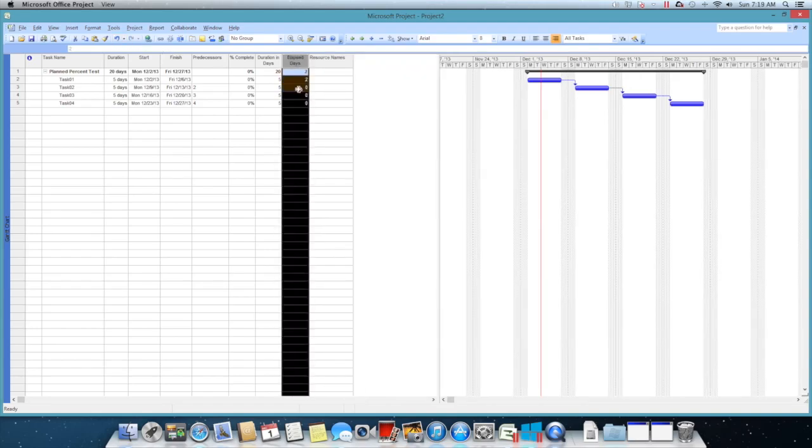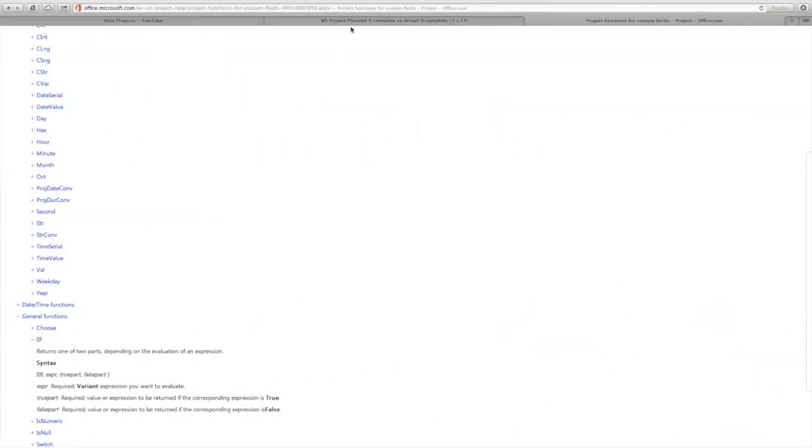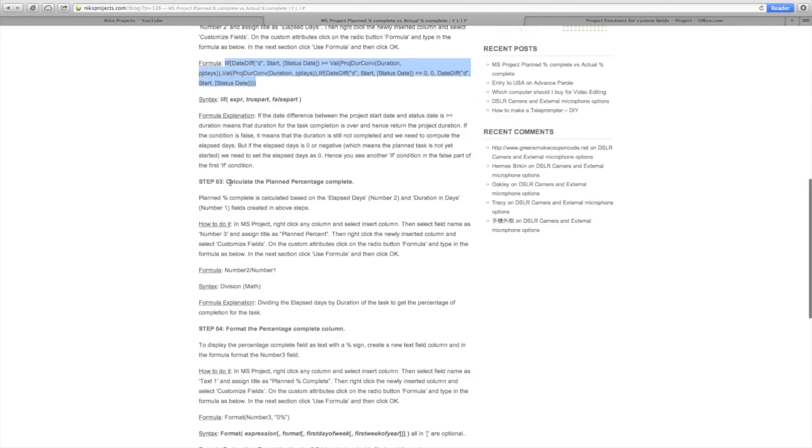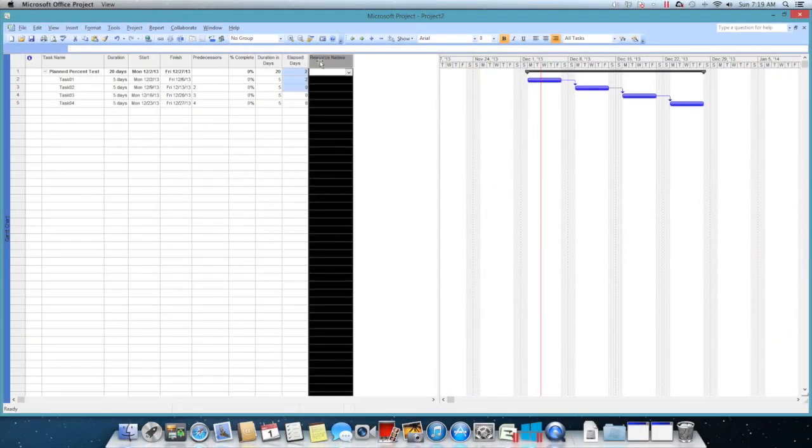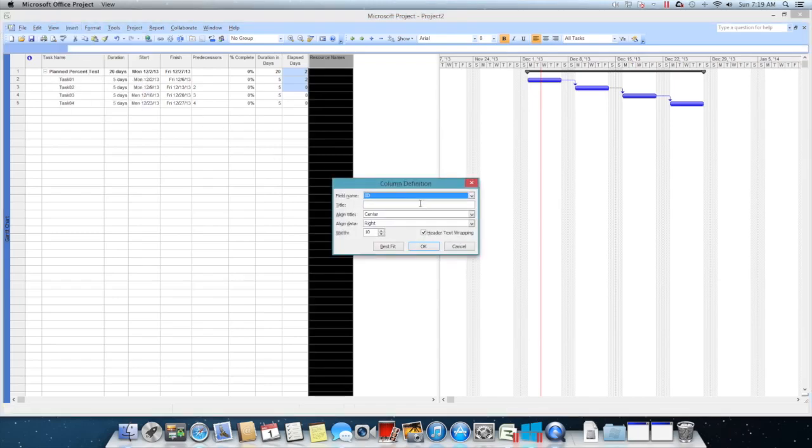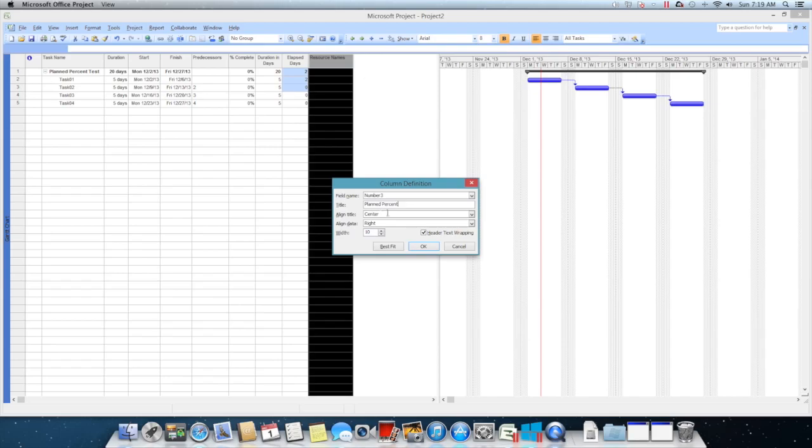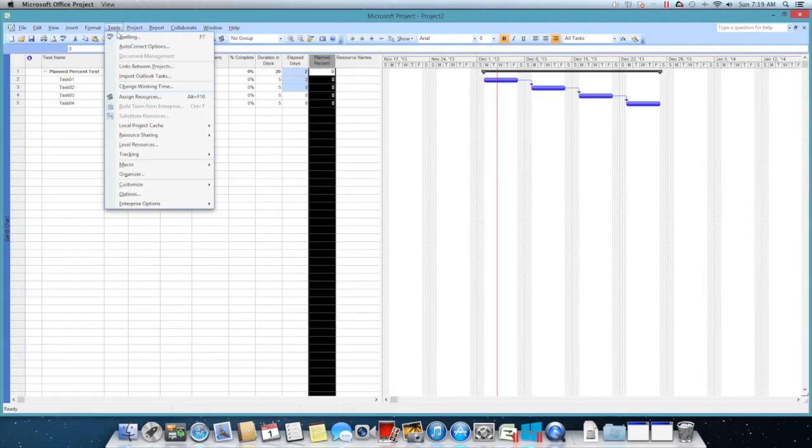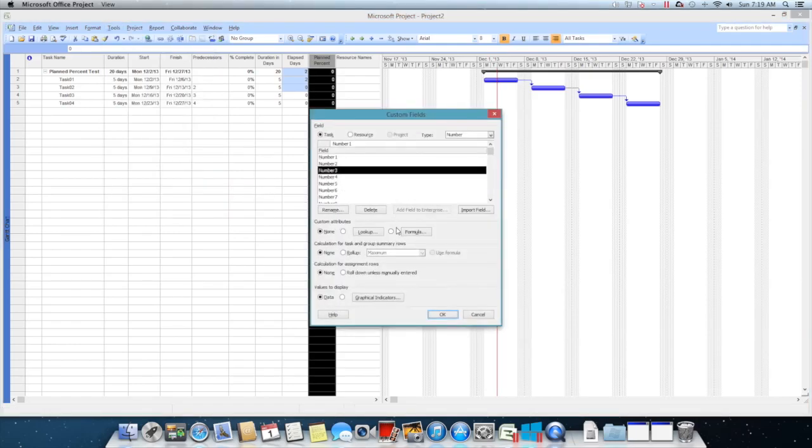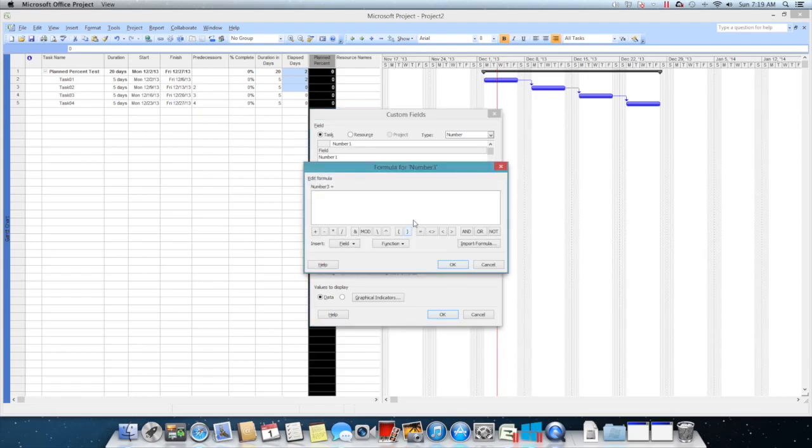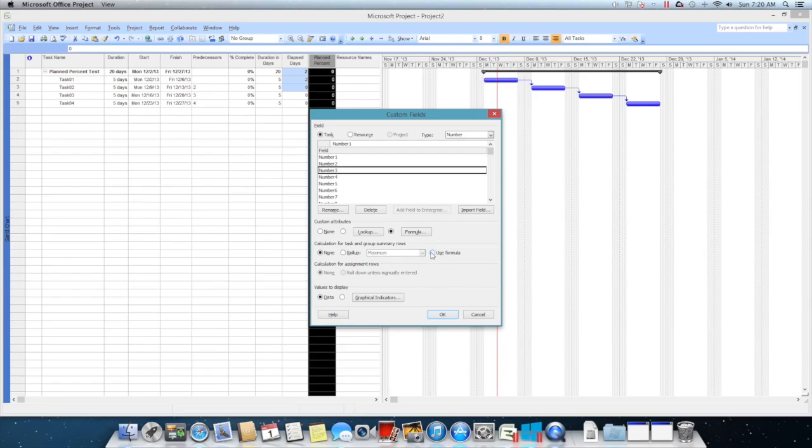Go back to our blog and now taking the step three, which is nothing but planned percent. I'll copy that and I'll say insert column. I need a number again. Since I use number one and two, let's use number three and paste in the field. Then go to Tools and customize fields, use the formula. Basically I'm just, this is number one and I'm number two, so in order to arrive at the number three I'm just dividing number two divided by number one. Just give OK and use the formula.